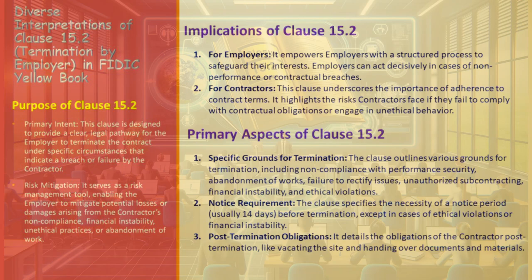This clause mandates a notice period, generally 14 days, before the employer can proceed with termination. However, in cases involving ethical violations or financial instability, this requirement may be waived, allowing for immediate termination. The clause also specifies the contractor's post-termination obligations, including vacating the site and handing over all relevant documents and materials, ensuring a smooth transition. Understanding the various interpretations of Clause 15.2 provides insights into the rights and remedies available under the FIDIC Yellow Book.